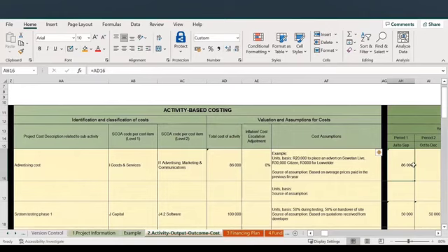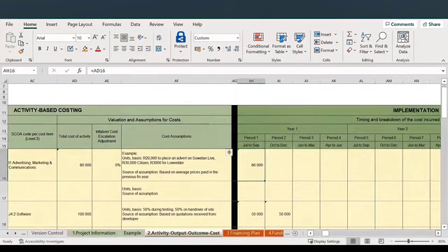It's to do with the recruitment or the advertising at the early stage. So we do expect that it will be incurred and expended in the first period, July to September, i.e. paid. So as mentioned earlier, it is a cash-based PIMP. So we are expecting to pay in one of these months, and that's all it will be for that activity.